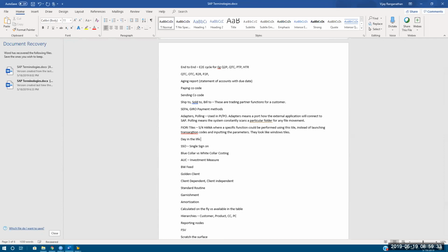Day in the life, they call it day in the life again. It's another term they use. For example, when they implement SAP and they test, they say day in the life, because they just do everything like they normally do and make sure nothing is impacted. When they're acquiring a company and doing an integration project, they do lots of testing, integration testing, regression testing, quality testing. Day in the life means you're doing everything, not just specific to what changes we did. We're just going to run the entire operation and make sure there is no impact.